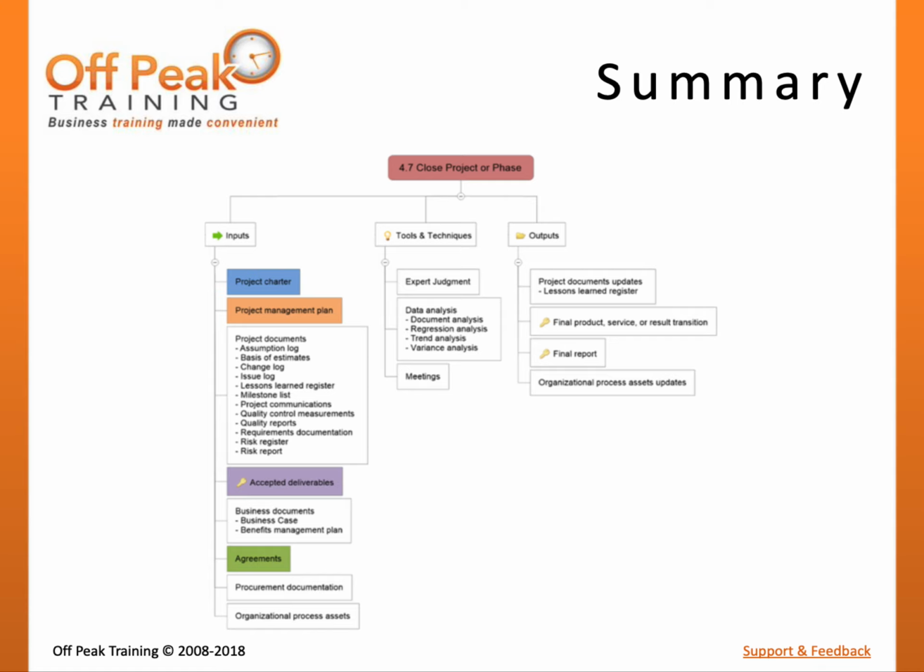In the event that a project is terminated early, this process should be performed to investigate and document the reasons for termination and the extent of completion. In addition to understanding what is part of this process, it is also useful to consider what is not part of this process. You may notice that there is no mention of releasing the project team, as they will be needed to help with this process. Additionally, there is no mention of closing any contracts that may be sponsoring this project, since this is outside of the scope of project management.